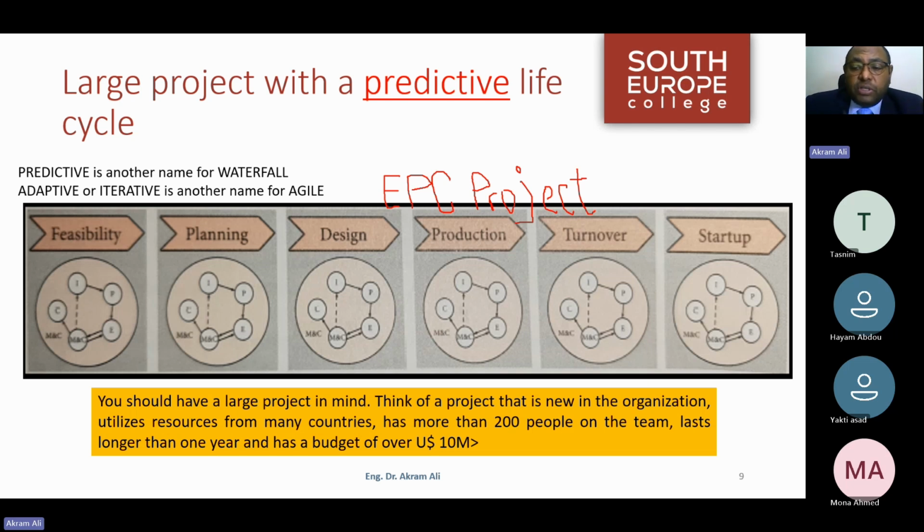Because if a valve, a resource or a material is not available when the scheduled date comes, the task is not going to be executed. So I have to elaborate the definition and the inputs of tasks enough so I understand when I have a look ahead.